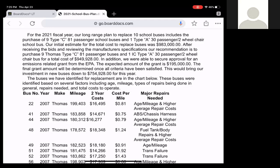And if I could just add one more thing, I had this idea before, and I didn't share it with any of the other administrators. One of the things I think we could do is stick to the schedule, because I don't want to necessarily take this line item out of the budget because of the effect it would have down the road. What if we paid for this out of this year's fiscal budget, the 2019-2020 budget, as we close out the fiscal year, with the excess that we think we would have from savings of operating for gas and tires and those kind of things, and then we would just leave this amount in the budget, and this is your cushion? Then this $754,000 is a cushion in your budget to absorb some of those potential revenue shortfalls that we might have, in addition to what we already saw. It would give you an additional $750,000 just as a buffer.